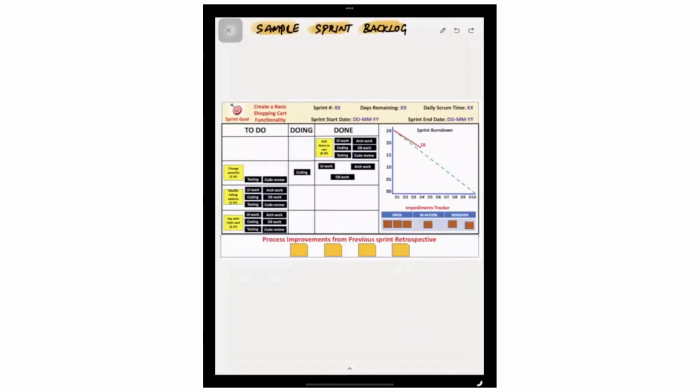So after a few days of work, it will be looking like this. Once next 3 to 4 days, for example, this is done and these 2 tasks are done, and this item will be verified against the definition of done, and the developer shows it to the product owner. Let's say product owner approved it. Then it will come here, and again 3 story points. So let's imagine day 6 it is done. So 16 minus 3, 13 somewhere here, 13. So that is how the burn down also will be updated continuously.